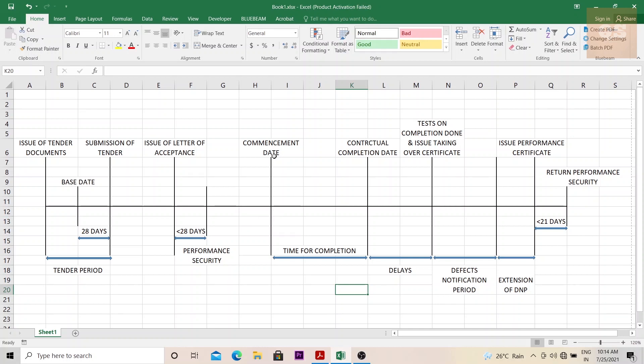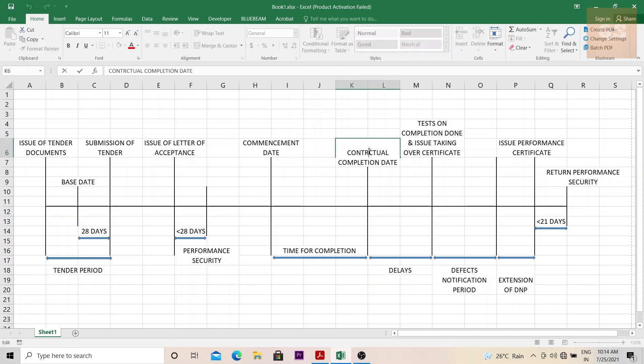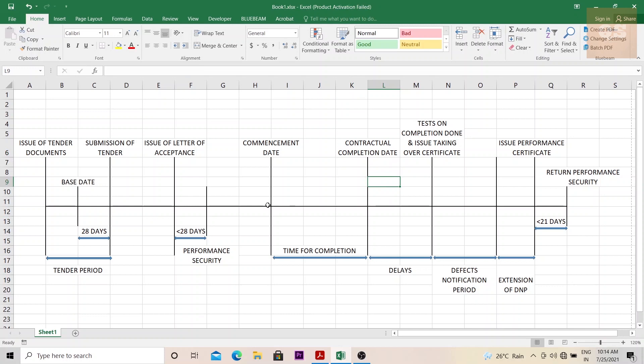Once the commencement date begins, there is a contractual completion date. This is the date that is mentioned in the letter of acceptance. This is called the time for completion. Normally within this date, the contractor has to complete and hand over the project.